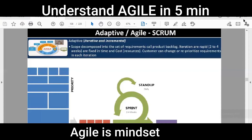You take all those user stories and make a product backlog — which is nothing but a combination of user stories. Then the product owner (not called sponsor here) comes and prioritizes those stories: this is number one, this is number two, we want this story implemented first, then this one. This prioritization step is called grooming of the product backlog.